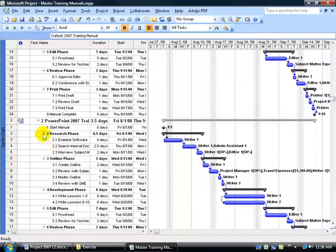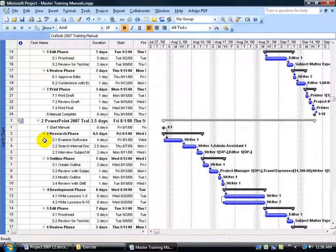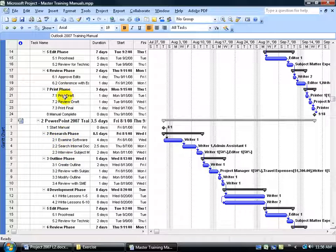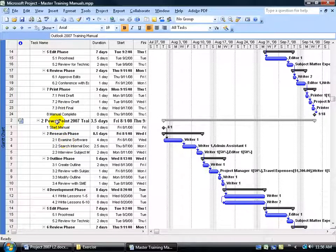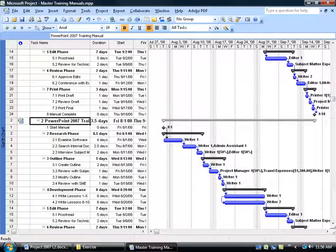Then when I came down here, this would be project 2 dash 2, project 2 dash 2.1, and so on. So I could tell whenever I'm looking up here or below or in my reports what project I'm in, and not just by the actual title of the project. So in order to do this, I need to set up the WBS codes at the individual project file level.